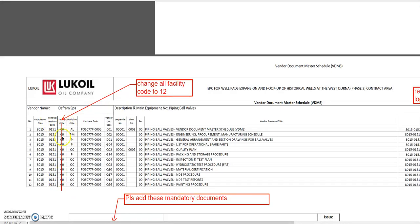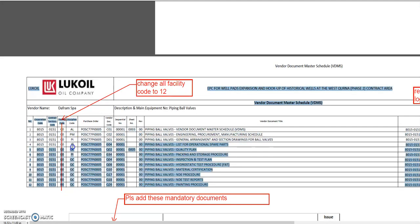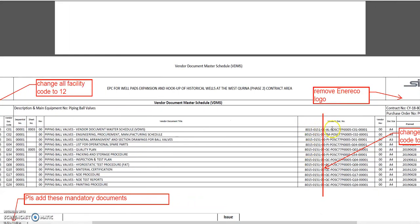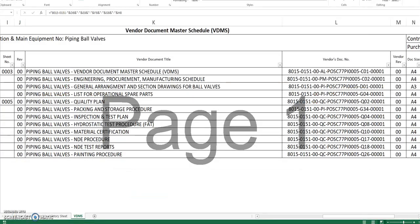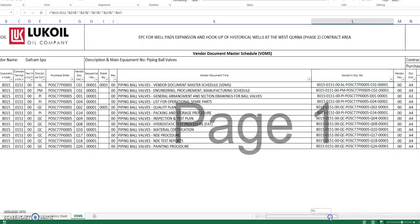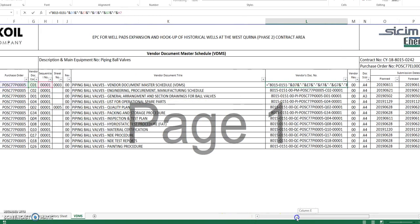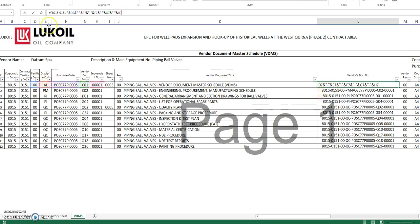Okay. Now, we know that the facility code is 12, so this is 12 right here. You can find this in the vendor documentation procedure. Now the list of documents is in the material requisition, so you have to check. This is the native file — we call it the native file. If you look here, there's a formula, and that formula is this. It's always the same, doesn't change. But the facility code is 00, so it's wrong — it has to be V12; you have to change it as well.